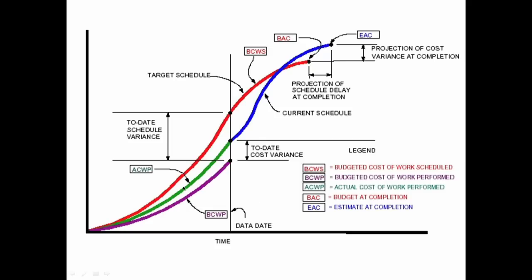In this comprehensive graph: green is the actual cost of work performed (ACWP), the red graph is the budgeted cost of work scheduled (BCWS), and budgeted cost of work performed is the earned value (BCWP). At the monitoring time, we obtained the earned value and ACWP, and had already had BCWS, enabling us to calculate the variances.